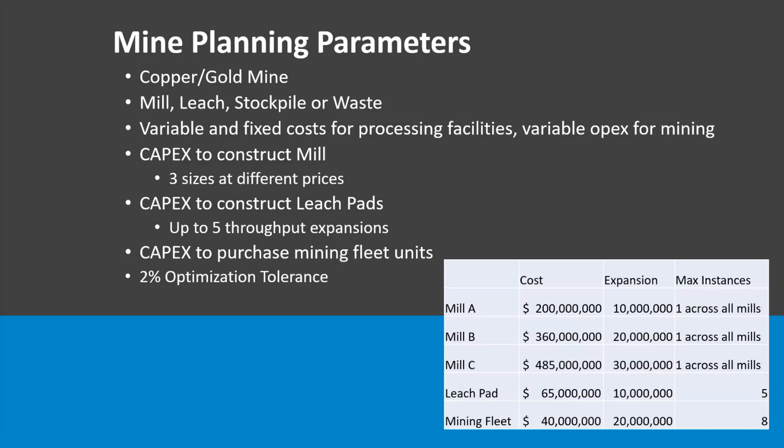Lastly, the mining fleet. I could have gone in and modeled individual shovels at different sizes, but that can get a little bit painful when you're looking at life-of-mine solve times. So for this example, we're looking at mining fleets — $40 million each — and that covers a shovel, a number of trucks, and support equipment for that amount of material.